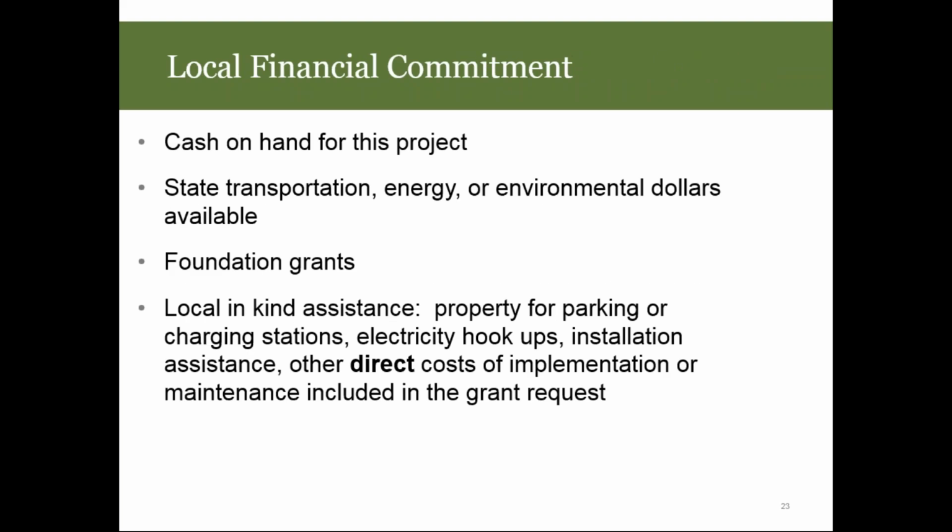Local financial commitment match can be cash on hand for the project, and you heard people on the panel talking earlier about how they took the existing reserve fund or money that they had set aside or were receiving for vehicle replacement, and then when they did their grant application, covered the marginal cost on top of that to go electric rather than 100%. Also, one of the panelists had an area that they were planning on implementing electric.